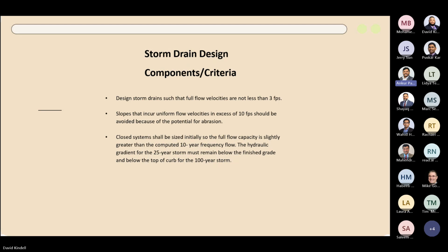But that does become a big headache, because if we do see a crack in something that needs to be replaced, then that has ramifications for roadway design, including MOT, and obviously our drainage and stormwater and ENS as well. So it is a can of worms, getting that stuff added in.